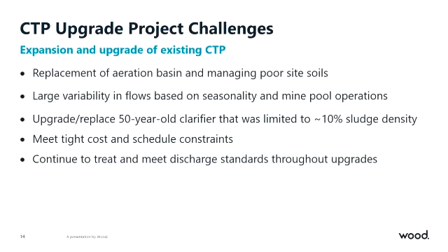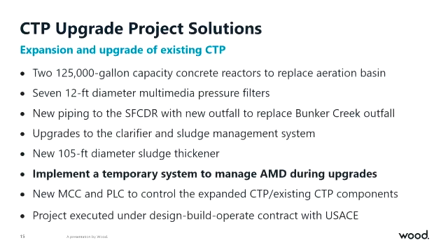And then throughout the entirety of the upgrades project, which is the big focus of today's talk, was the need to continue to manage AMD throughout the upgrades project. So we couldn't just turn off a spigot and stop mine water from coming down to the plant. We had to find a way to actually treat it throughout the entirety of the construction project. So it was an interesting challenge.